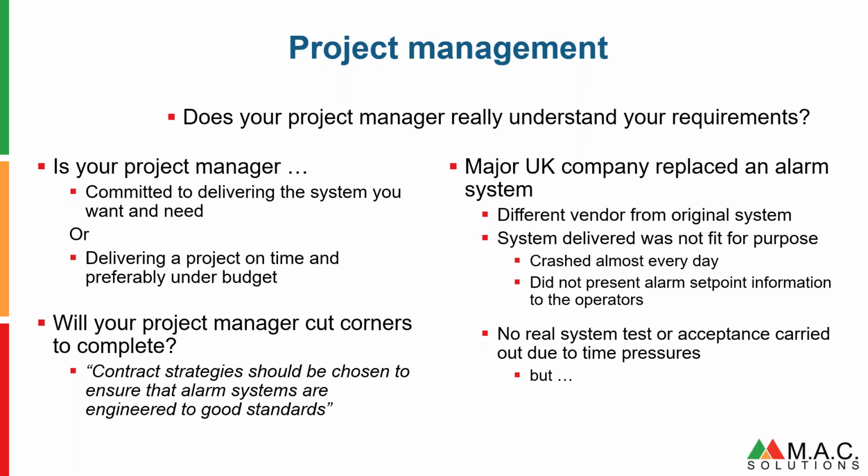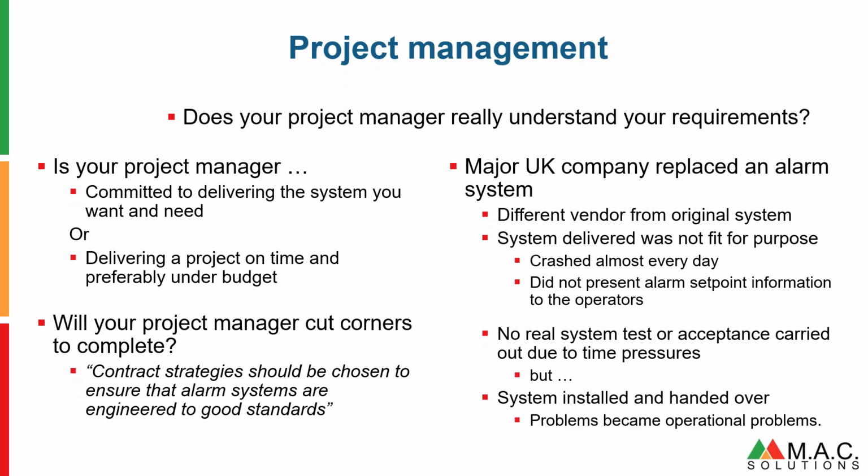So the project manager completed the project, missed out on software testing, missed out on other things, and therefore the system was delivered. Once it was installed and handed over, the project's closed, on time, in budget, but there were loads of problems for the operations people to have to deal with, loads of issues they needed to get resolved, all of which came at an extra cost because the vendor had closed the project. The project's been delivered, signed off, you've paid for it. If you want anything else, you'll have to pay us to make changes.